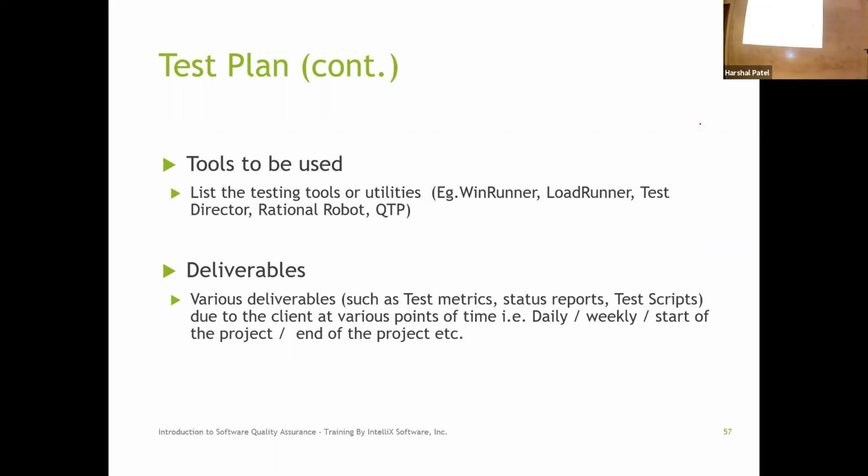So let's take an example. If I'm building a house, the contractor says, hey, it will be ready in 3 months. 1 month down the road, torrential heavy rain keeps coming in for 3 weeks. They couldn't build during those 3 weeks. But if I waited until the end of 3 months and asked, hey, is my house ready? I'm ready to come with all the movers and everything, and the house is not ready. That's a disaster. The better option is for the builder to keep me up to date and say, because of this, we can't meet this, so the new moving date will be this or that. Same thing in this world: as you're going through the development, you keep providing updates on how you're progressing, so that they have confidence you're going to meet that commitment.